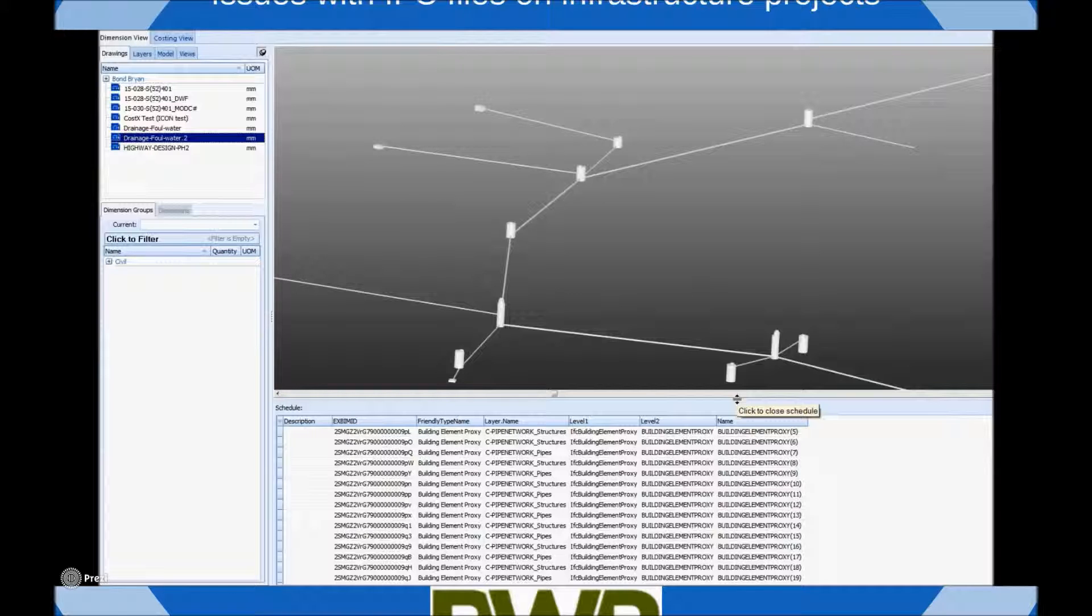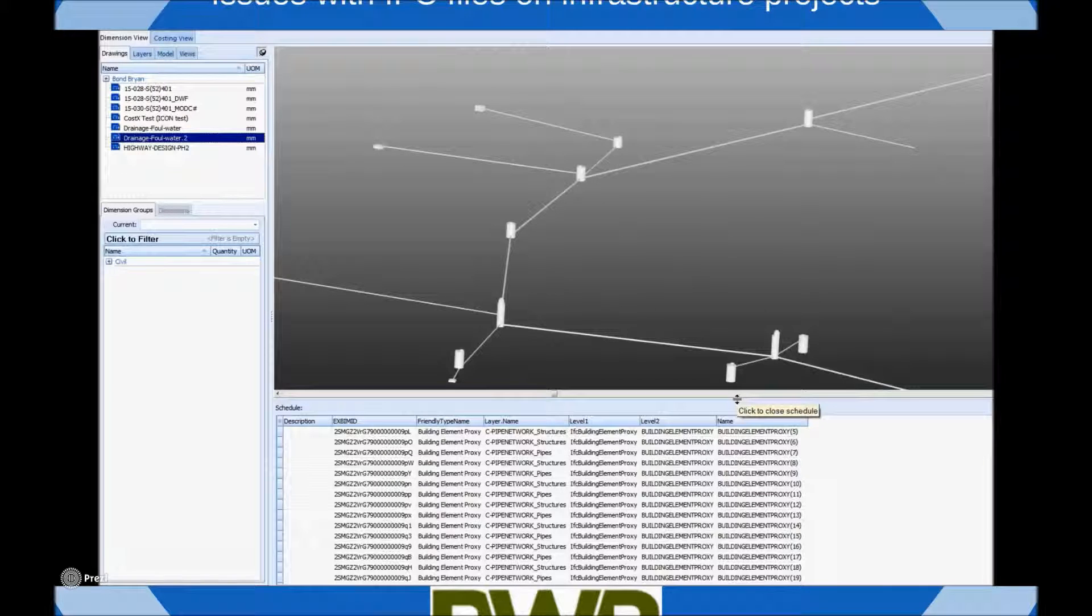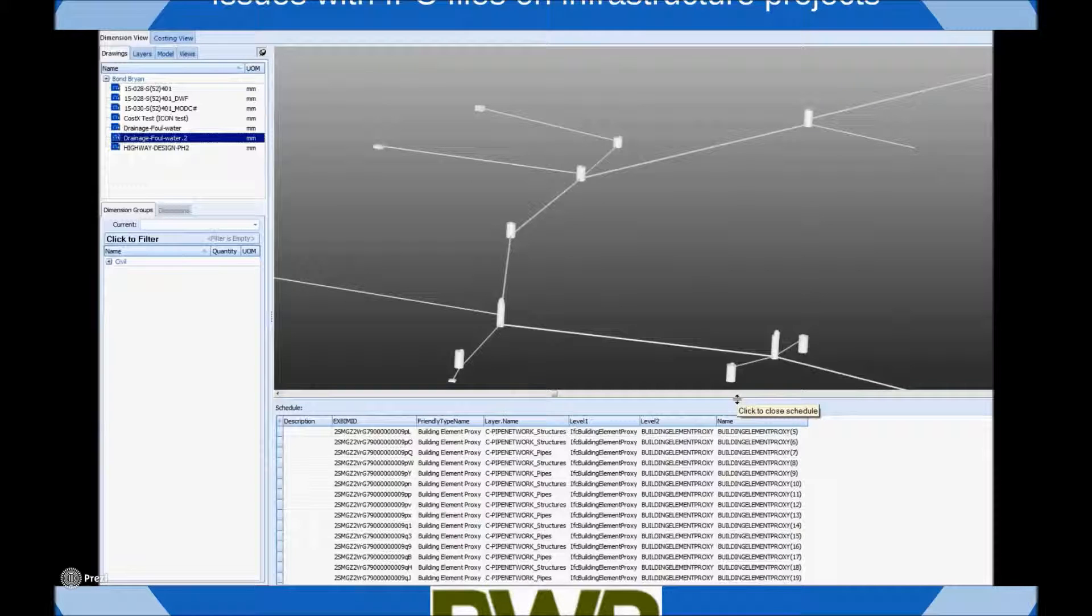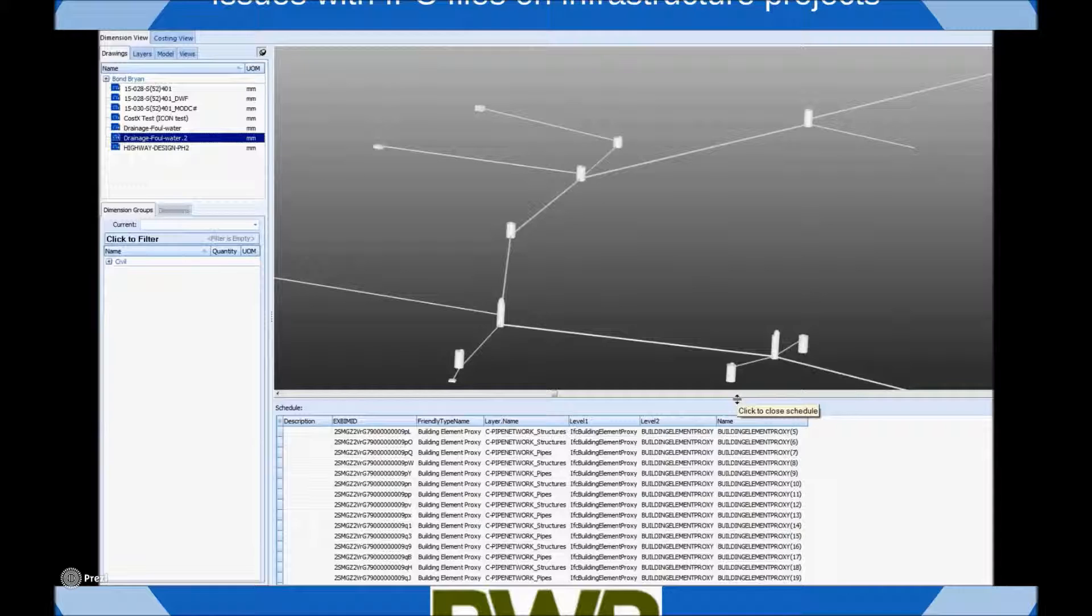However, on reviewing the object properties in the schedule below there are no quantity data exported so a QS would have a hard time applying appropriate cost information based on this data. So as discussed we are working with BWB to improve the IFC output for infrastructure designs.